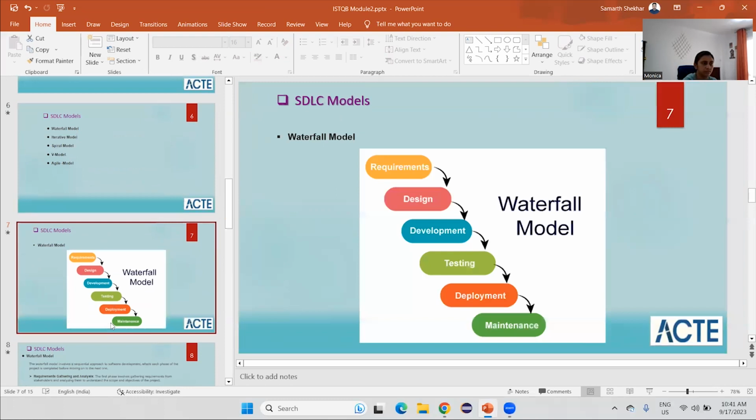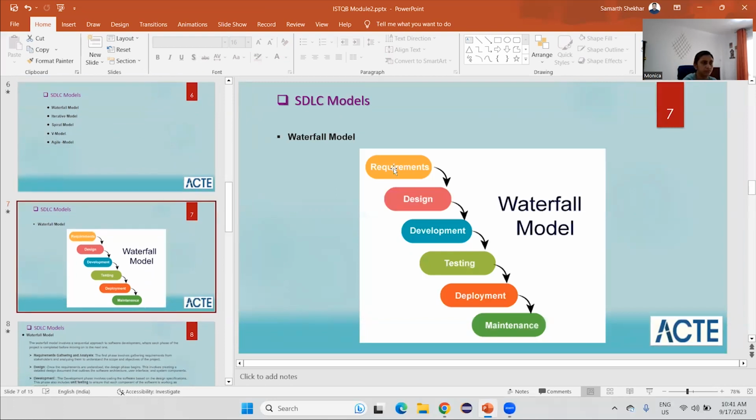So what happens is, in the first stage only, requirement analysis, the involvement of the customer will be gone. After the SRS document is created, reviewed and approved by the customer, there will be no involvement of the customer. So it is not clear to the customer until the deployment stage is finished what the product is and how it is done. So if the customer is not happy with the product that you have delivered in the deployment stage, then again that is a loss of value creation. You have not created enough value for the customer.